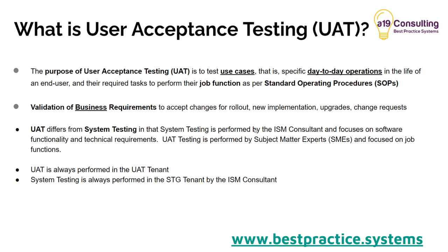So UAT differs from system testing in that system testing is performed by the ISM consultant and focuses on software functionality and technical requirements. UAT testing is performed by subject matter experts, SMEs, and focuses on job functions. That is the big difference, and I'm going to mention that again and again because it's a new concept for